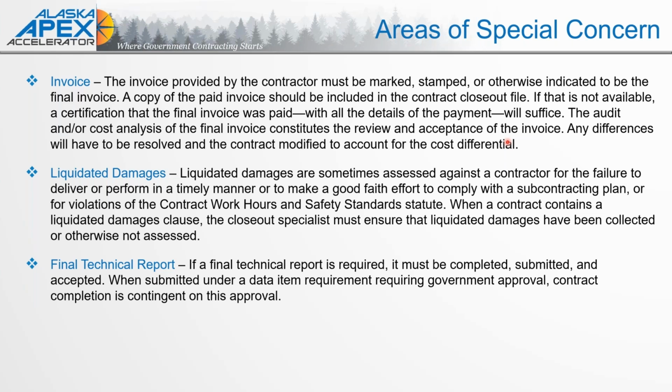Let's talk electronic fund transfer. On the agency side, if you have multiple contracts, it's very easy to have a deposit that is made up of payments for more than one contract. So part of that responsibility is ensuring that there is no overpayment or underpayment, and that you are separating out those funds and marking that as paid against the appropriate contracts.